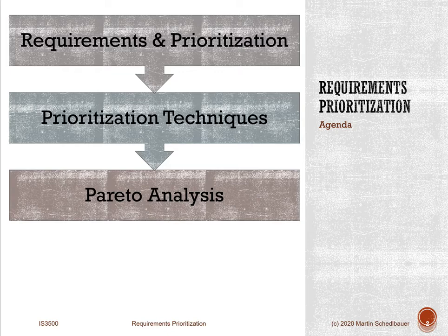So prioritization simply means that you've got to decide which ones you're going to include as part of the scope of an IT project and which ones you might defer until a different project or simply not in scope. It also includes deciding which requirements to do early in the project and which ones to do later. There's always the chance that later on you run out of resources, budget, or time, and you want to make sure that the most important requirements are addressed. So that's requirements prioritization. It's a scope decision and an order of implementation type of decision that you need to make.